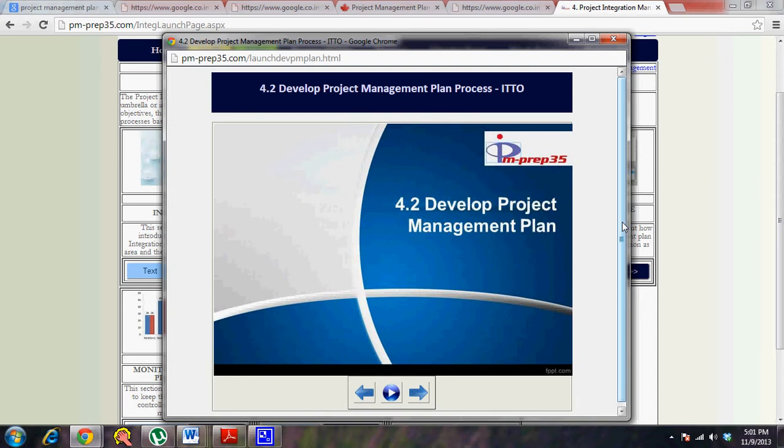So the time baseline is also called as schedule baseline, which is nothing but your project schedule and the related documents. Then you have the scope baseline, which is nothing but your WBS and scope statement and the WBS dictionary. So then you have the cost baseline, which is nothing but your cost budget. So once these have been agreed, the project manager documents all these in the project management plan document as such, and then he puts in other plans also.